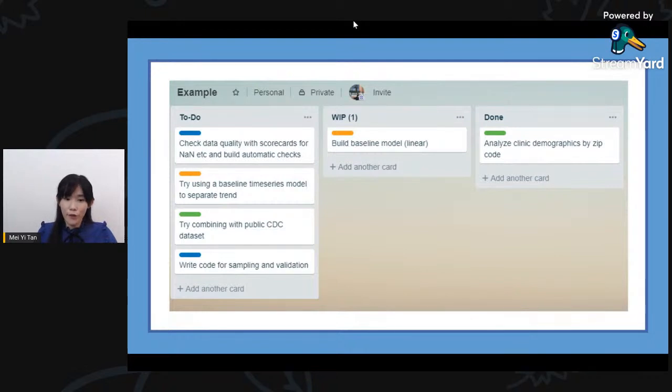So from the data side, you are able to define how long the sprint needs to be based on the data sets, whether 2 data sets or 3 data sets, which are the sources of your data, and then how many users are going to use this product after you generate it. So in that case, you can decide how long a sprint is and how many modules you need to put within a sprint.